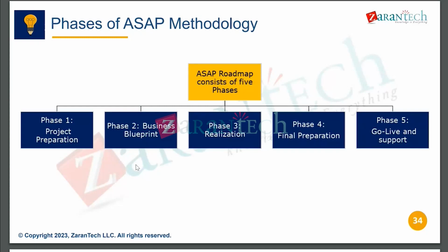Where the functional consultants or respective SAP consultants will do the cutover activities, right? So we need to maintain some custom tables. We have to upload the master data. From the purchasing side, we have to upload the initial inventories, like stocks, whatever is available in the plant; that inventory stock will be maintained over here. Some of the FI activities, so these kinds of things, master data, everything will be uploaded in the technical go live phase. Once technical go live is successfully completed, then we will release the system to the business for the actual go live, where the business can use the system and run the day-to-day transactions.